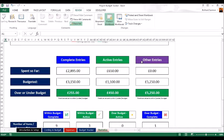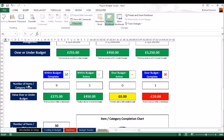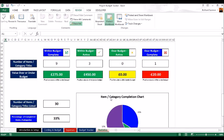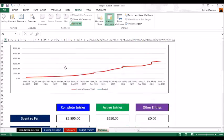Active entries show spent so far, budgeted, and under/over figures. 'Other entries' are items you've quoted for but haven't purchased anything against yet — that spend should always be zero, but you can see you've got 5,255 pounds still to spend in that category. There's also a breakdown of how many items or category titles are within budget (active or complete), over budget (active or complete), plus percentage breakdowns: 33% complete, 10% still active, 57% still need to become active — giving you an overall project completion chart.